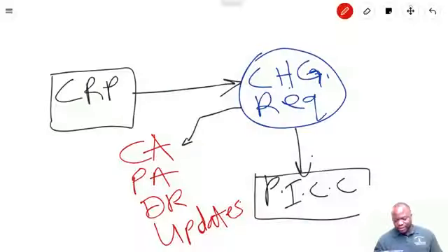It says change requests can be initiated from inside or outside the project, and they can be optional or legally mandated or contractually mandated. Change requests may include corrective action and intentional activity that realigns the performance of the project work with the project management plan.